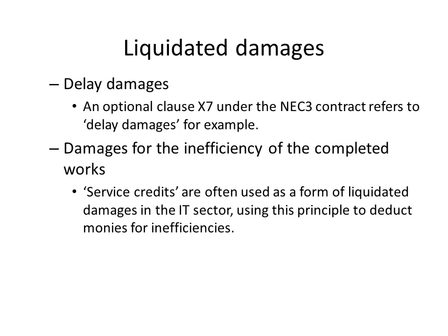Another way is to actually agree the damages before, in which case we'd call them liquidated, and an option clause X7 refers to delay damages, and often service credits are used as a form of liquidated damages in the IT sector, using this principle to deduct monies for inefficiencies. So you might agree a liquidated damages clause where there's so many £1,000 worth of damages, say for every day the project's late, up to a maximum of 14 or 20 days perhaps, otherwise the term would become a